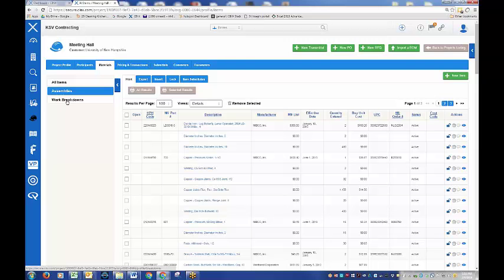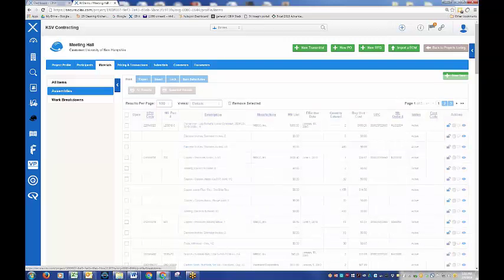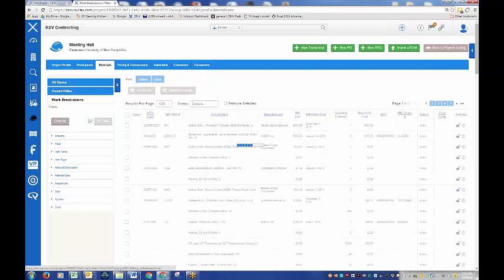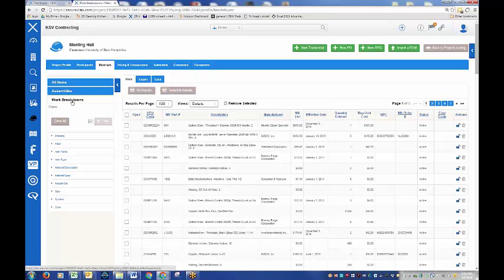I'm going to expand this thing called work breakdowns, because I think this is a really valuable part of understanding the capabilities of this tool. A lot of people use work breakdowns not realizing it's called a work breakdown structure, but that's the term that estimating companies use as they build out their tools. And basically a work breakdown is how an estimating tool, and certainly a CAD tool, allows a professional to organize and categorize that project or the takeoff.